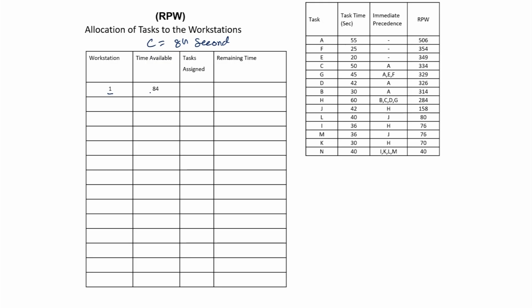Now, we will find out the elements which are not having any predecessor. There are 3 elements which are not having any predecessor. So, they are the feasible tasks which can be assigned here. These are not feasible tasks. This group of tasks are not feasible at this stage to be assigned, because they depend upon something else which should be carried out before these tasks can be done.